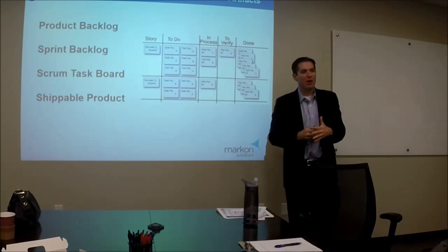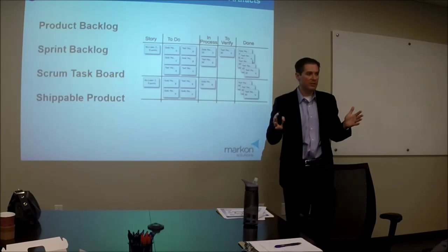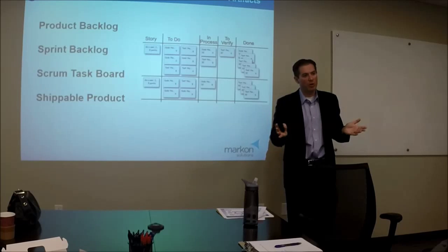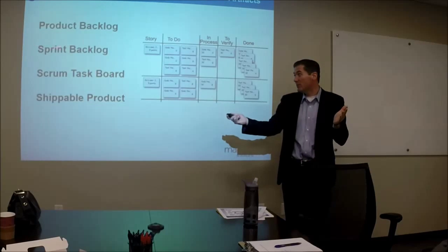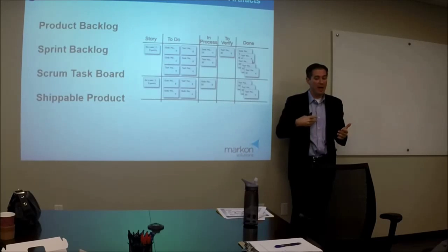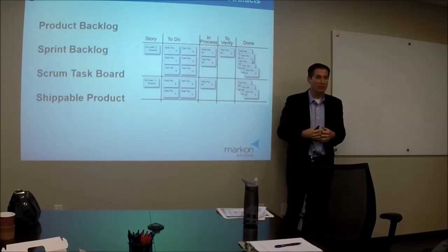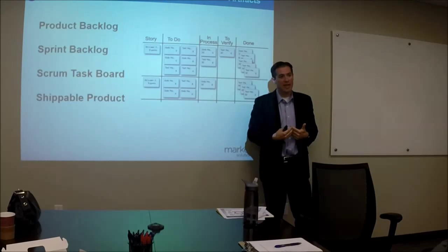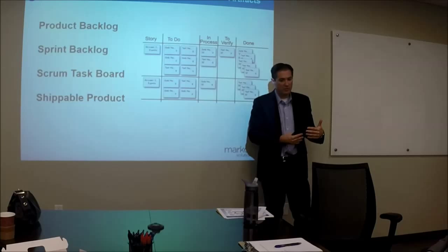I think there are a lot of immature sprint teams out there that say, hey, listen, we're just doing what we're doing this sprint. And to some degree, that's important. You're asking these people to commit to the amount of work that you've given them. I think when you start saying, I want to add new work to the sprints, what I would say is you've got to reassess things. Hey, should we only be doing 2-week sprints? If we have that much change undergoing, should we only do this every 2 weeks?